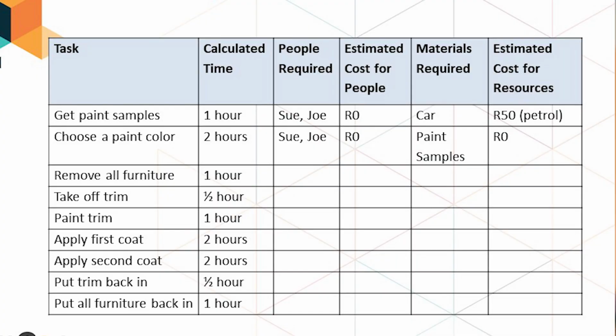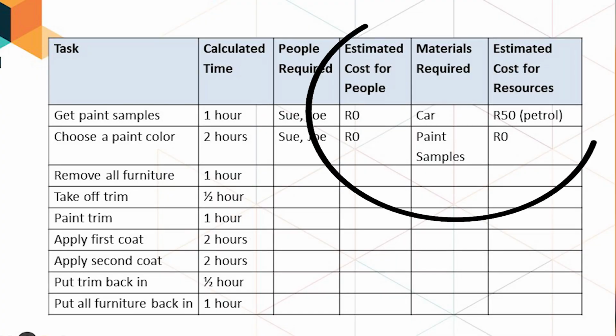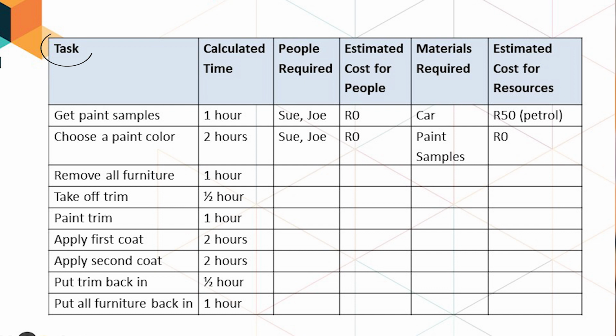After you have estimated time, the next thing you do is to decide what resources you will need to accomplish each task. In project management, resources means people, materials, and money. A common method of listing is to list the task, estimated time, and resources required, all in the same table. How detailed you get, again, is totally up to you.